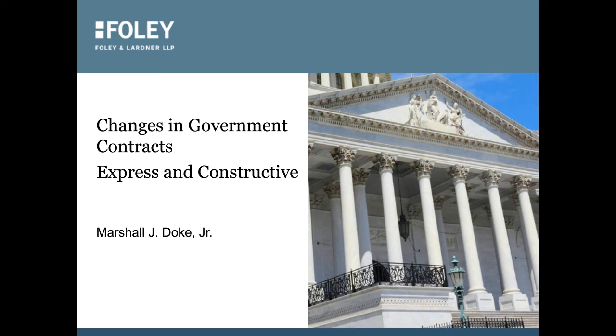Allowable cost. The subject of allowable cost is unique in public contracting. There is no comparable limitation in the law of damages in commercial contracting. The federal cost principles in FAR Part 31 must be used in pricing changes and other contract modifications.